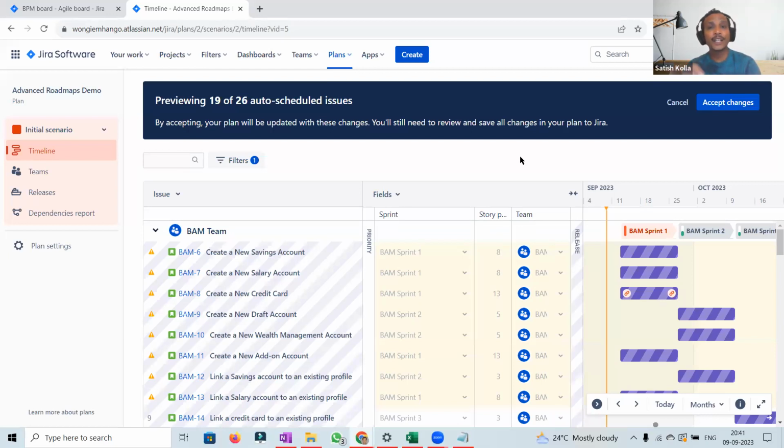It might try to see which sprint it might fit based upon the sprint capacity or the dependencies, based upon the estimates we provided. Right. So that's the reason the issues where the story estimates are not there, it hasn't done any estimate. So only if we have any dependencies created, right? Based on the dependencies, the tool will try to adjust the sprints, adjust the capacities across the sprints and everything.